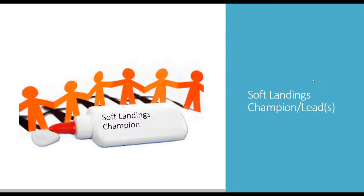So who ultimately should manage the soft landings process? The answer is the soft landings champion. It should be nominated at the beginning of the project and it should be a person ideally from the client side. Soft landings champions are both the fuel and the glue on a soft landings project.